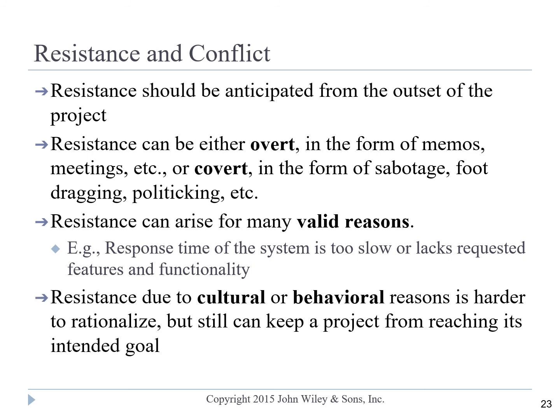And sometimes the resistance is due to cultural or behavior reasons. I shared with you the example with the clerks of the court and forming the advisory group to make recommendations for best practices to their peers, to the other clerks. If we had done it another way, meaning forcing or dictating the best practices from the administrative office, most likely that would not have been successful.